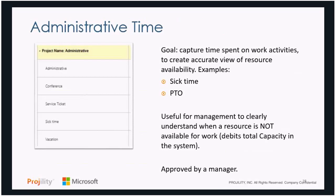And what that means for a manager, a project manager, is they can look at their project and forecast out, I've got a week where Jim is not available. It's going to take all of Jim's work and push it out to the next week. What does that do to my whole schedule? So as long as you have actuals coming in, this is going to help your managers forecast when work is going to be finished so they can set expectations with the business, or work with the resource manager and say, hey, we got a problem. This deliverable is due next Friday. Jim's out next week and he has another 20 hours of work. I need to solve that problem now. And you want to try to address this before it's a problem, obviously, before it becomes a risk or escalates to an issue.